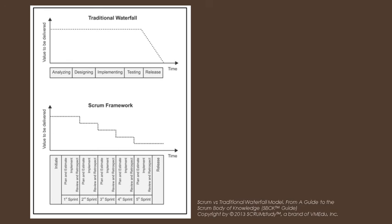Comparing the waterfall model to the Scrum framework: Scrum delivers features incrementally, while waterfall simply delivers phases. Traditional waterfall development is phase-based and sequential and does not give value until the very end of the project. Scrum turns that model on its head and delivers new features every few weeks. Instead of focusing on a big release in the future, Scrum divides complex work into simple pieces, large organizations into small teams, and far-reaching projects into a series of short time horizons called sprints.